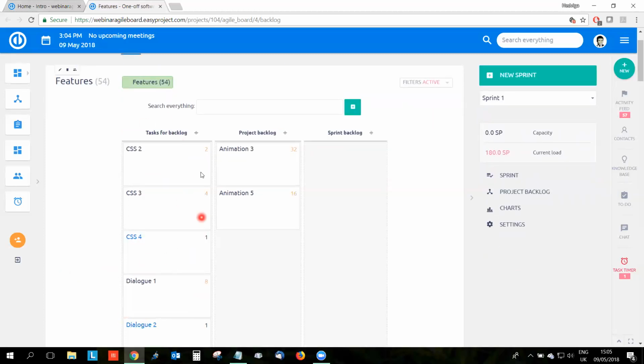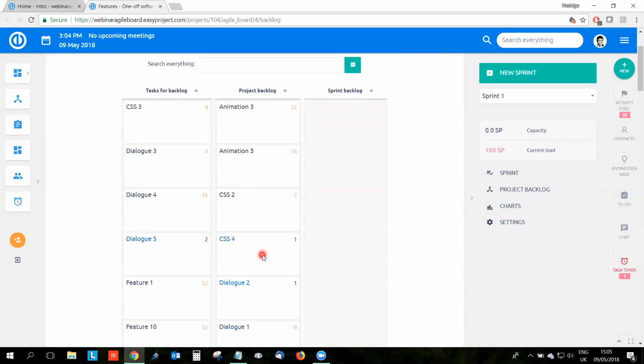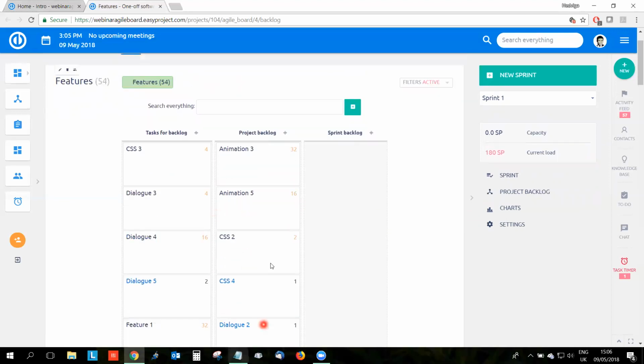So we have here our tasks backlog, and now I can move one task or more tasks like this to my project backlog. Or this is the product backlog. So the second column, here you can add tasks which are created to work on your product, for which you are using this Scrum. Normally, there is another role which is working with this part of Scrum, and that is the product owner. So he can choose tasks which will go to product development. And now out of these tasks, I can choose which will go to my current sprint backlog.